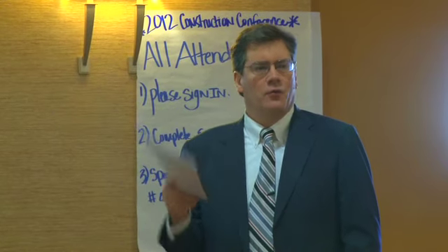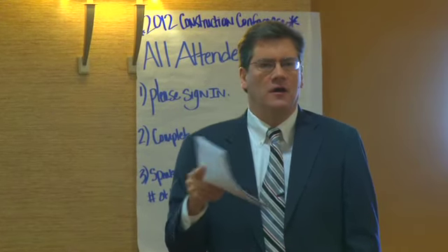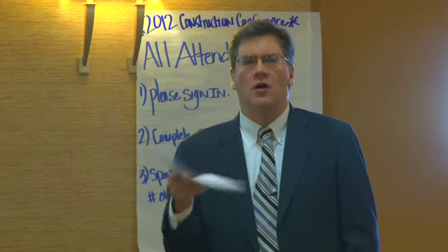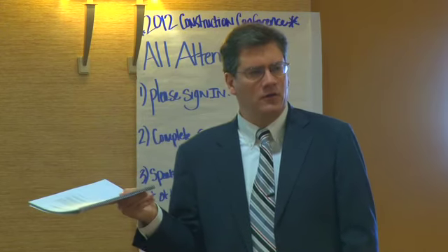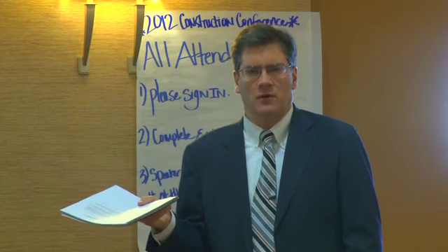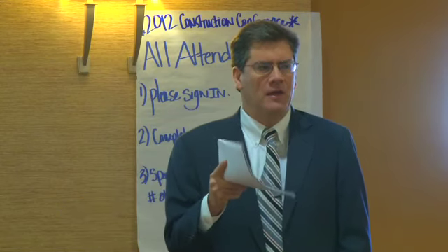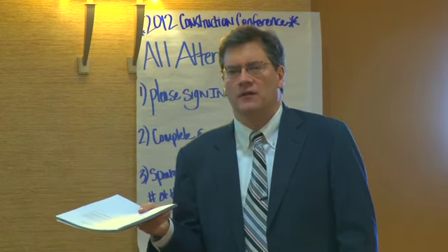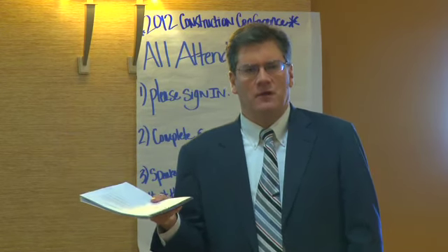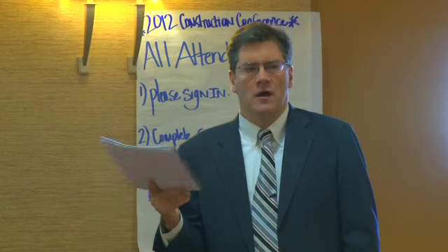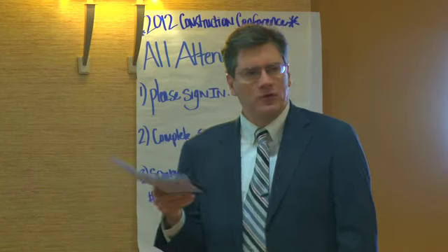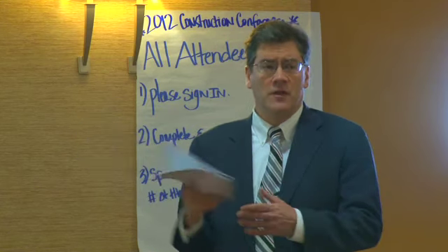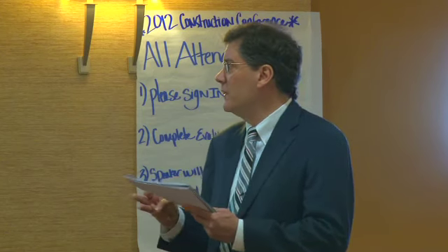But guess what? The reason you're not being paid is generally because somebody doesn't have the money to pay you. And they're not likely to have the money to pay all of your attorney's fees in addition to their attorney's fees, in addition to the amounts that you want to recover. So these numbers have to make sense for you to file this kind of a lawsuit. In general, I'm thinking a number that's in the above $25,000 range, $35,000 or more, $50,000, you know, for sure. And once you get above $50,000, you're even in that range of prices where you can afford to take an appeal if you lose, if you think you're going to win on appeal. Okay?